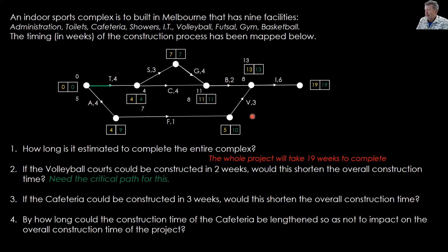So, is volleyball on the critical path? That's the first bit of it. There's the second bit. There's the third bit. Now just stop here. Why didn't I go straight across here? Right, this is the critical path. In here, on this line, you can see I've got float time. Sorry, 4 and 7. That 4 and that 7. I've got a float time for this activity.